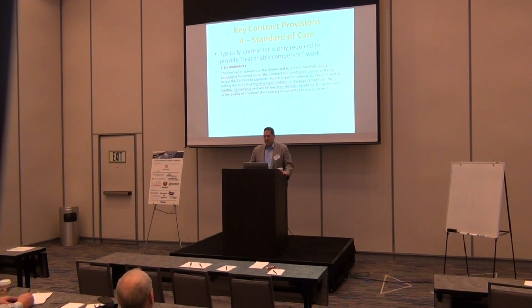And so the typical warranty language in the AIA talks about that you use materials and equipment that are of good quality and new, and that the work will conform to the requirements of the contract documents and free from defects, okay? So it basically says you didn't screw it, all right? That's what you agreed to do.